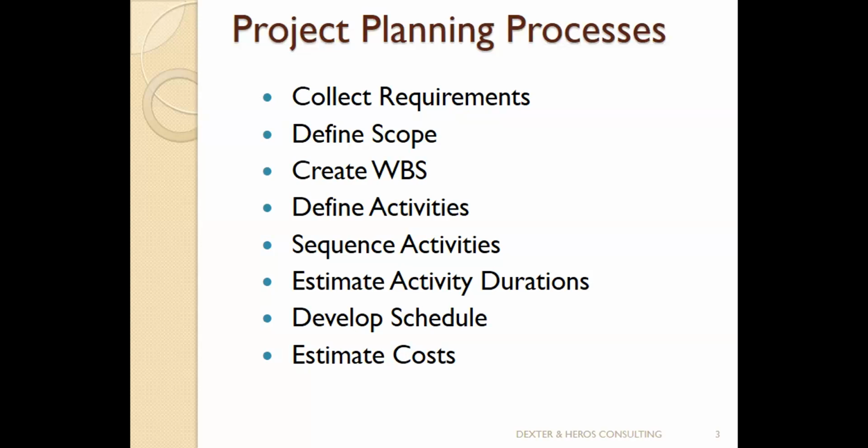Again, you can see that I couldn't have estimated costs before now. Until I know the activities, and of course the sequence of the activities, I'm going to explain why I need to know the sequence before estimating cost. Until I also know the resource available and know the duration for each activity, I cannot estimate cost. Why? If you ask me how much this will cost, I will try to find out how many people will be working, how many equipment we need, and how long the people will be working there. These are elements that influence cost.